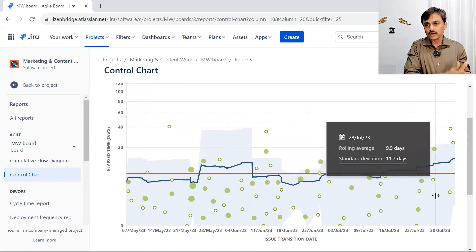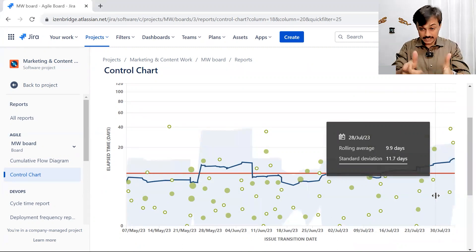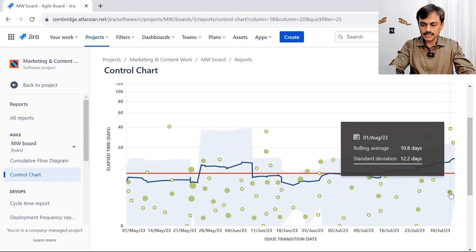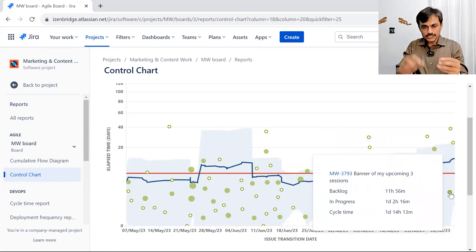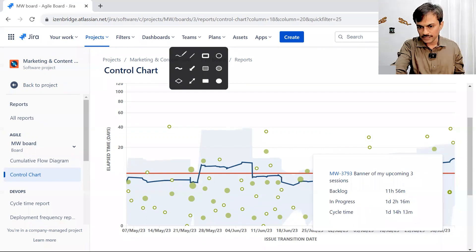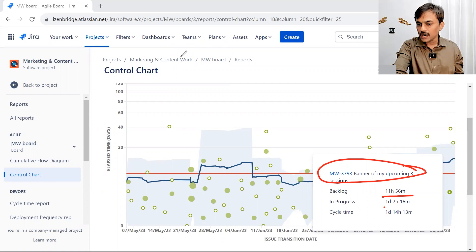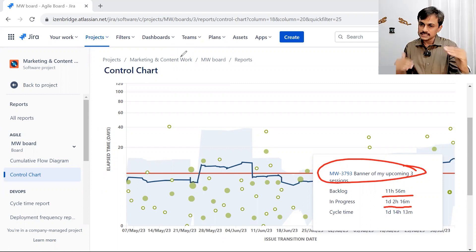The issue comes into Backlog, moves to In Progress, and Done is the final stage. Even when it departs In Progress, it accounts for the whole lead time cycle. If I click on a particular issue, I can see a breakdown: this issue was in Backlog for 11 hours 56 minutes, then in In Progress for one day and two hours, then got Done. So I get the total lead time as well as a breakdown of each stage.